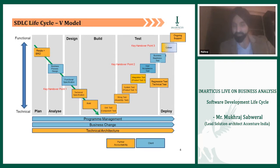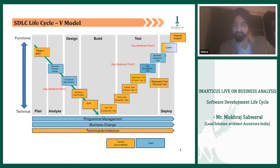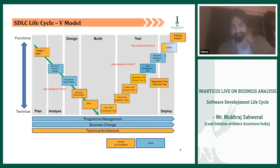Post design, we step into build: functional spec, tech spec, build, and unit test. Then testing. IT is very cost-conscious these days — even though the product must be tested thoroughly, testing shouldn't take very long. IT has automated its test cases, test plans, and test strategies. End to end, most things are very automated today, except for the basic parts: analysis and business process design. After this automation, the cycle time of product development has crashed significantly — from 1000 days to around 500-600 days, a 40% reduction.